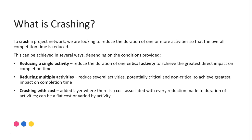What is crashing? When we say we're going to crash a project network, what we're doing is looking to reduce the duration of one or more activities so that the overall completion time is reduced. This can be achieved in several ways depending on the conditions provided in the question. We could be asked to simply reduce one single activity, looking to reduce just one of the critical activities to achieve the greatest impact on the completion time, and that's what we'll look at in this video.